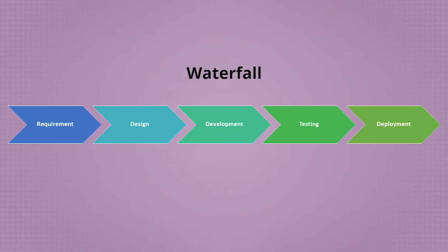For example, in a waterfall method, we'd start with defining scope. Once the requirements are confirmed, a design phase would be completed. After design finishes, development would start. And after development, maybe a test phase would be conducted. And finally, the product or service would be deployed to production in a single Big Bang release.